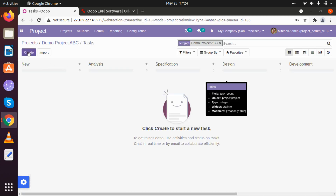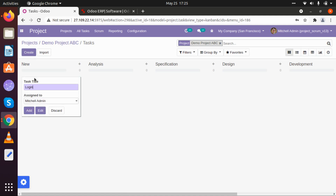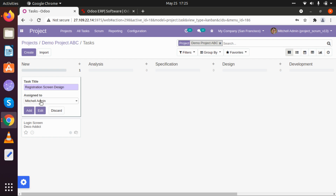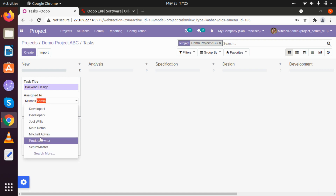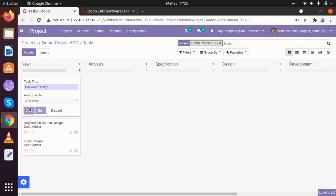Now let's create some tasks. Let's go to our task section and create some basic tasks. I am creating a task called Login Screen — it will be done by Developer One. I am adding that task, and once added it will be in New state. Now I am creating another task called Registration Screen Design — that will be done by Developer Number Two. I am creating a third task called Back End Design, and it will be designed by Joe Wills. I have added three different users for three different tasks.